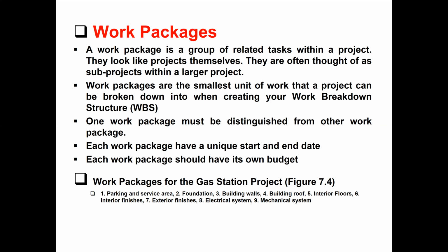Work packages are the smallest unit of work that a project can be broken down into when creating your WBS structure. Okay. So it could be identified, one work package must be distinguished from the other work package. One work package must be different from the other, so that when we sublet, we can bring in a subcontractor who can execute that work independently.